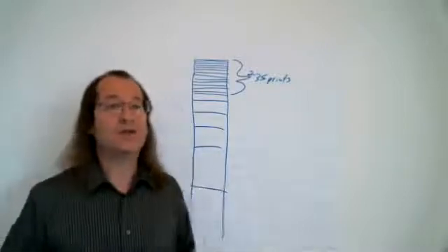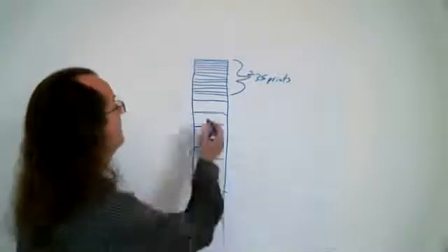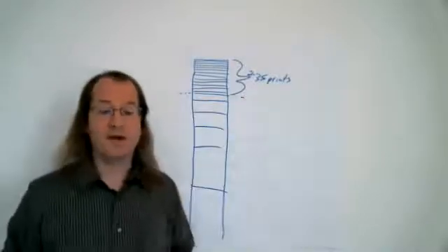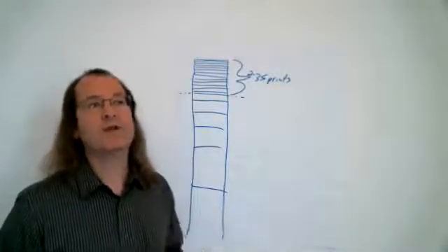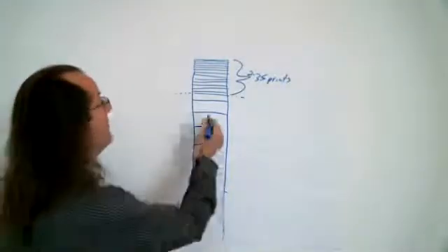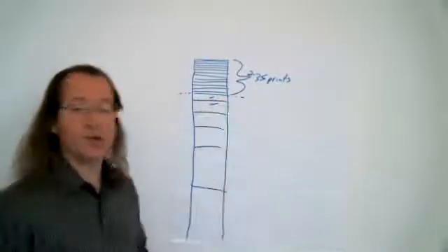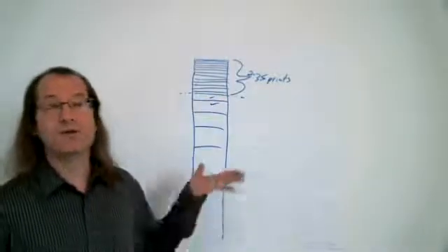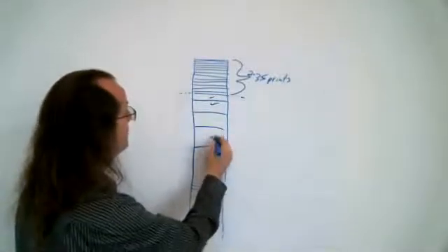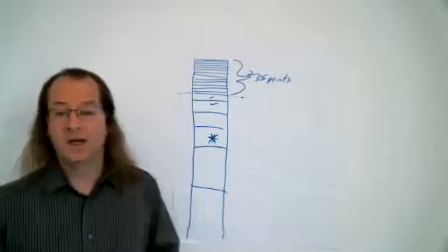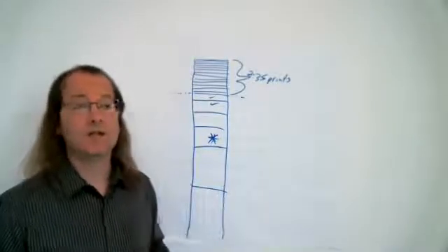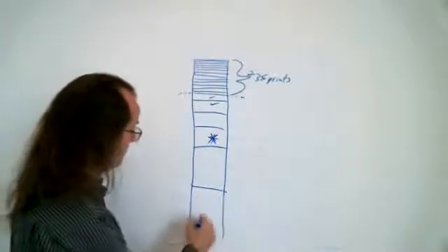Now, a good strategy for deciding which items to pick: well, we've got these sprint ready stories at the top. They're all ready to go, right? The team said, oh, those are fine. We can bring those into future sprints whenever the product owner wants to introduce them. So maybe we pick a couple of the stories right below that to try to do the work to get them sprint ready. Maybe we pick something from the middle of the product backlog and do the work to take it from being a large story to maybe a few medium-sized stories. And then maybe we're even introducing one brand new,